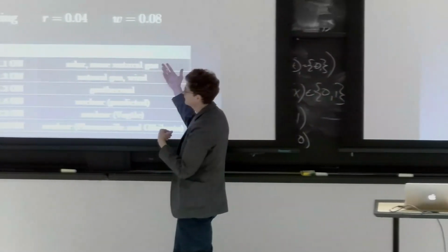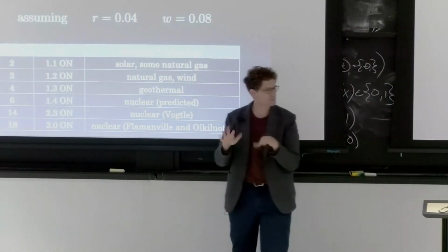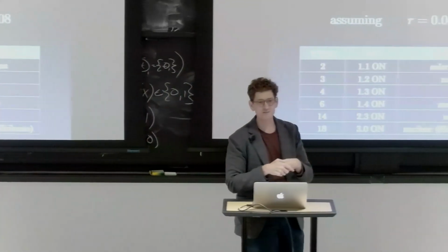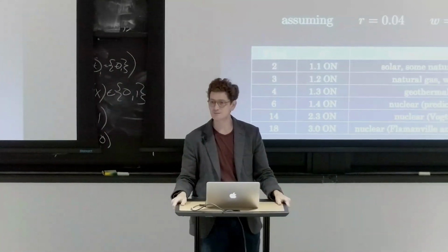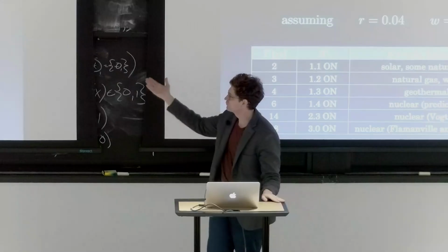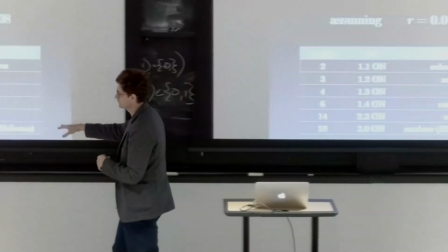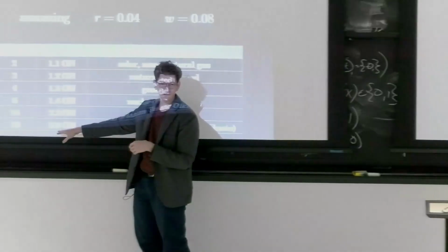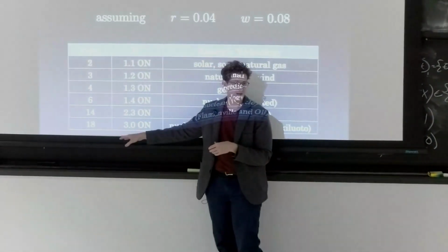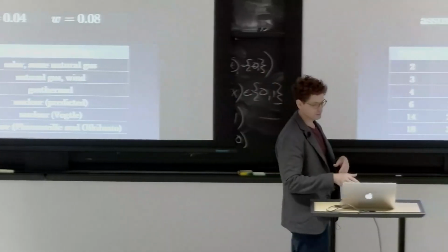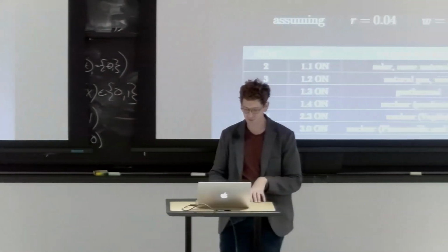Historically it's thought to be about 5%, but financing has become a little easier in recent years. There's so much money floating around that I'm going to put it at 4%. That biases these numbers. It makes them a little bit smaller at very long timescales because you pay less interest on a loan, so the difference between the overnight and the investment cost is smaller.